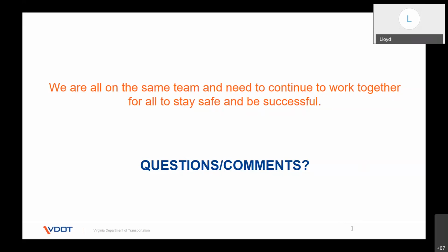Okay, let me jump in there. This is Lloyd Arnold from the local administered division with Michaela, the local administered projects manager. So regarding the direct communication from the locals to the rail, we want to make sure also that we include the project coordinator. We want that project coordinator to be your single point of contact. And if it turns out you guys are starting to work together with rail, that's fine. But they must be informed at all times of the communication. So I just wanted to make that clarifying point that we don't leave the project coordinator out of the communications.